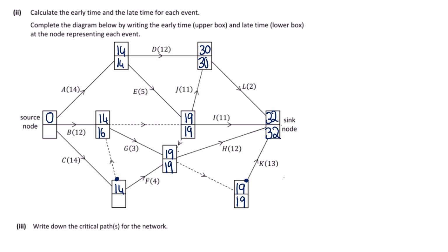I'm going to do this node next. So there's 2 that feed out of it. So the dummy will give me 16. F will give us 15. So that's going to give us the smaller answer there, which is 15.